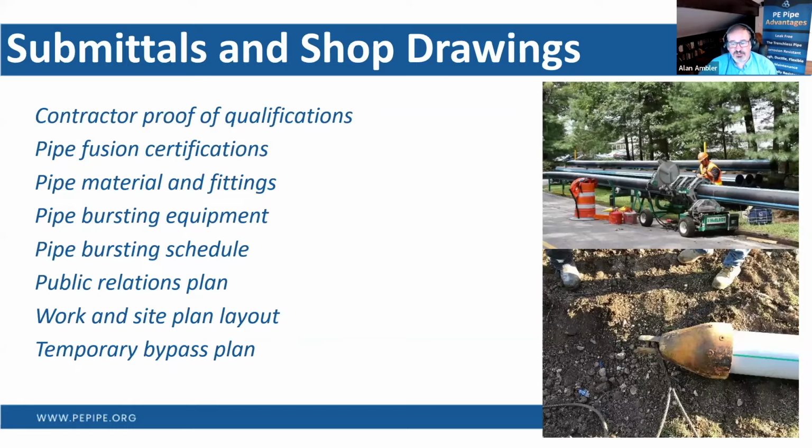Absolutely. That's a great question to ask, Jerry. Most of the displacement of soil while we're performing gravity sewer pipe bursting is up and out. It's not down.